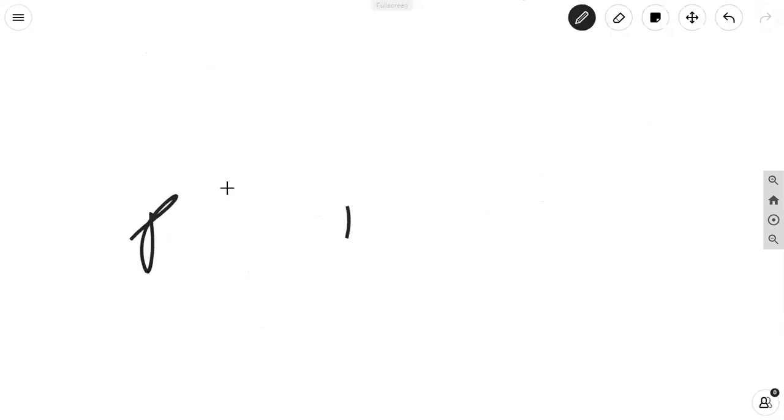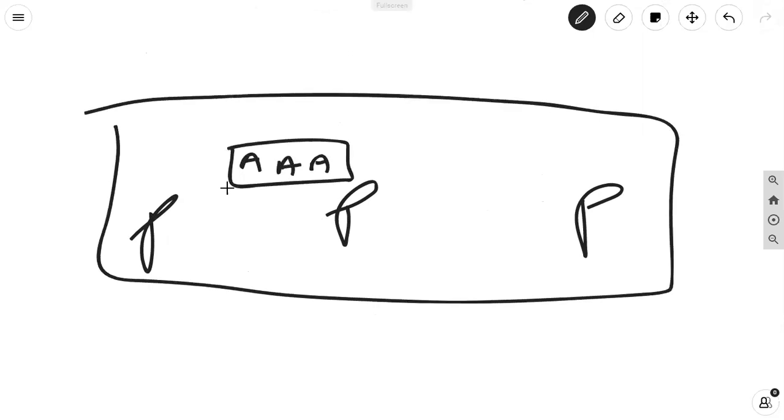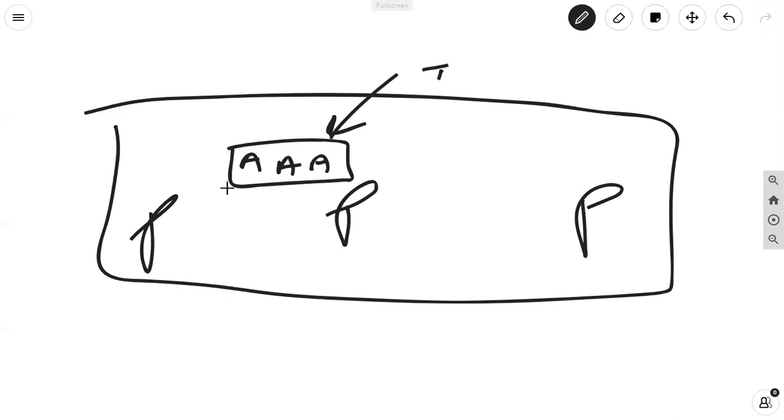So, the question then becomes, what are some of the mindsets and things that I could take from the world of Agile? Well, let me show you one more view of the world of hybridization. You could have Predictive, Predictive, Predictive. And then you could have a tiny little Agile component. What can you borrow from the world of Agile to make your projects more sensible? An example of this approach would be an engineering firm that is building a facility with a new component. While the majority of the project may be routine and predictable, this project incorporates a new roofing material. Hence, the introduction of an Agile concept. The contractor may plan for some small-scale installation trials on the ground first to determine the best installation methods to uncover issues early, while there's plenty of time to solve them and incrementally improve processes through experimentation.